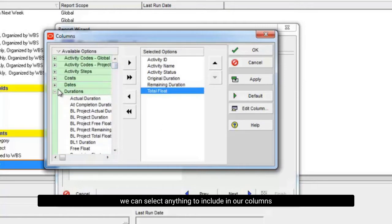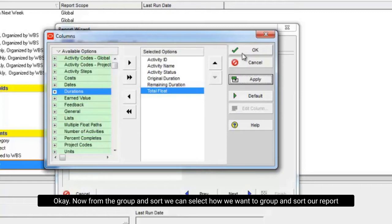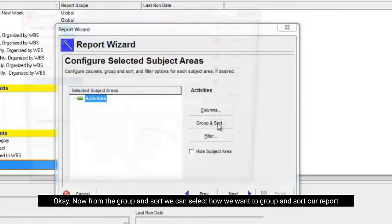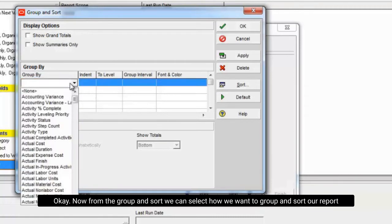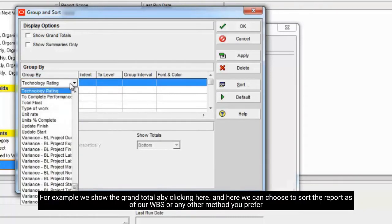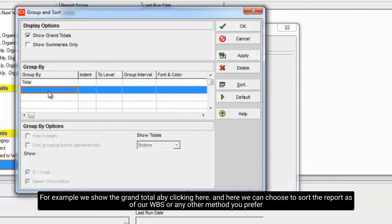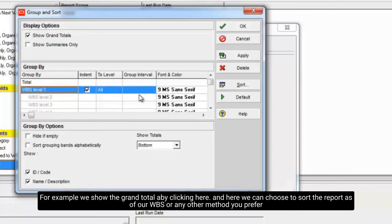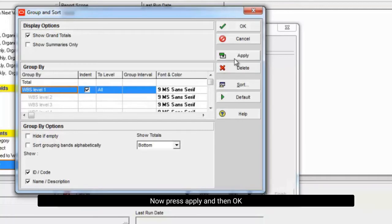We can select anything to include in our columns. Now from the group and sort we can select how we want to group and sort our report. For example, we show the grand total by clicking here. And here we can choose to sort the report by our WBS or any other method you prefer. Now press apply and then ok.